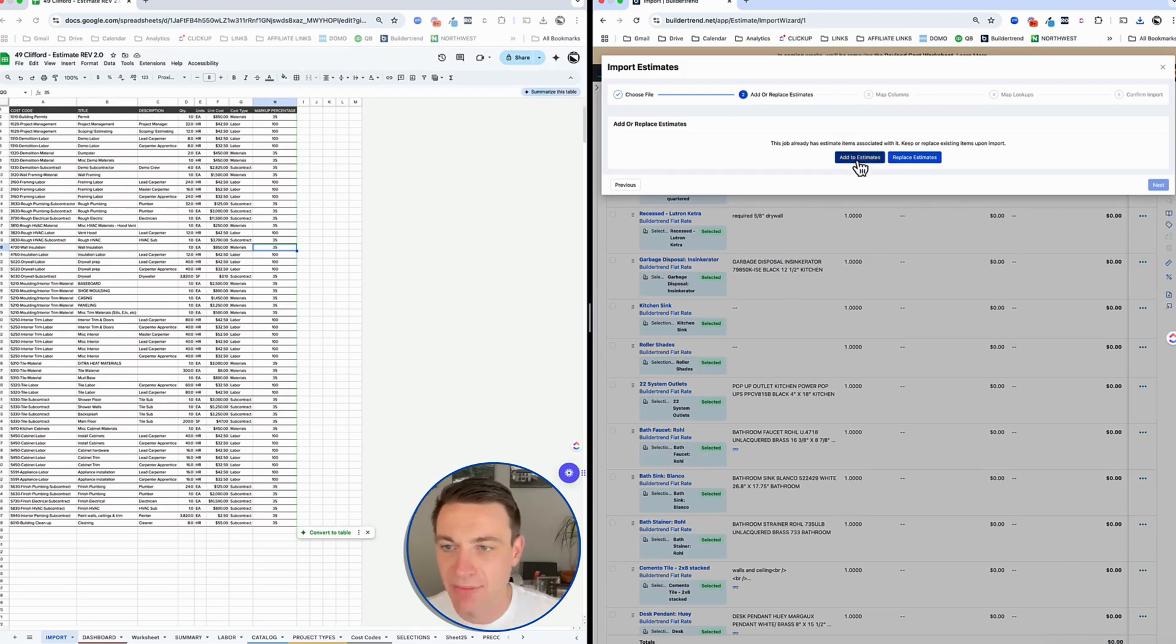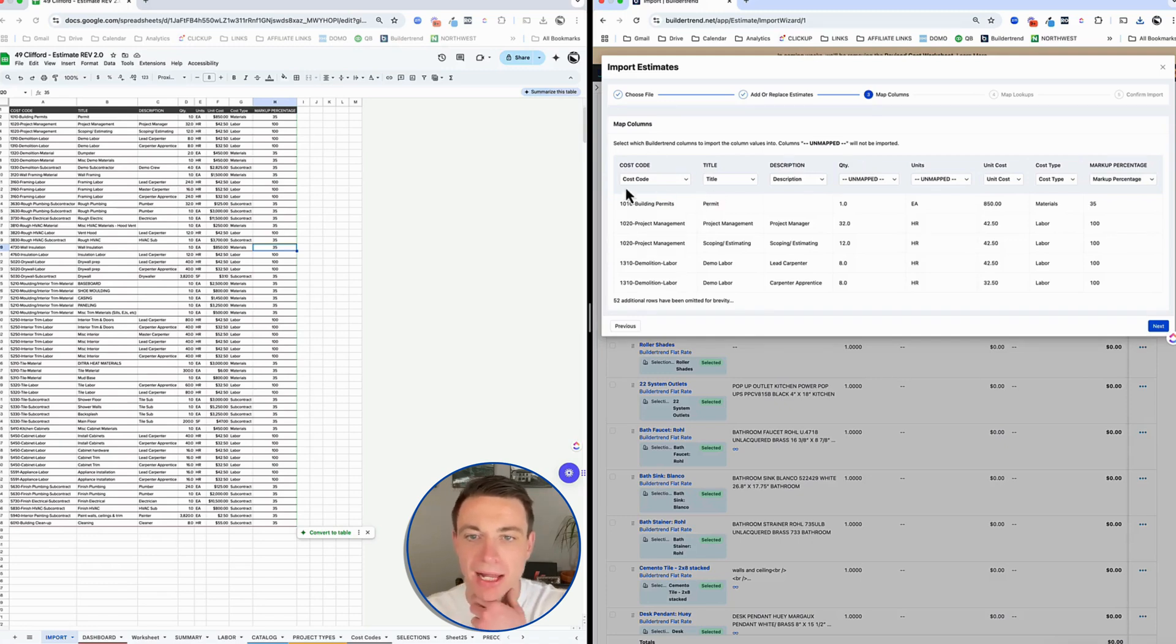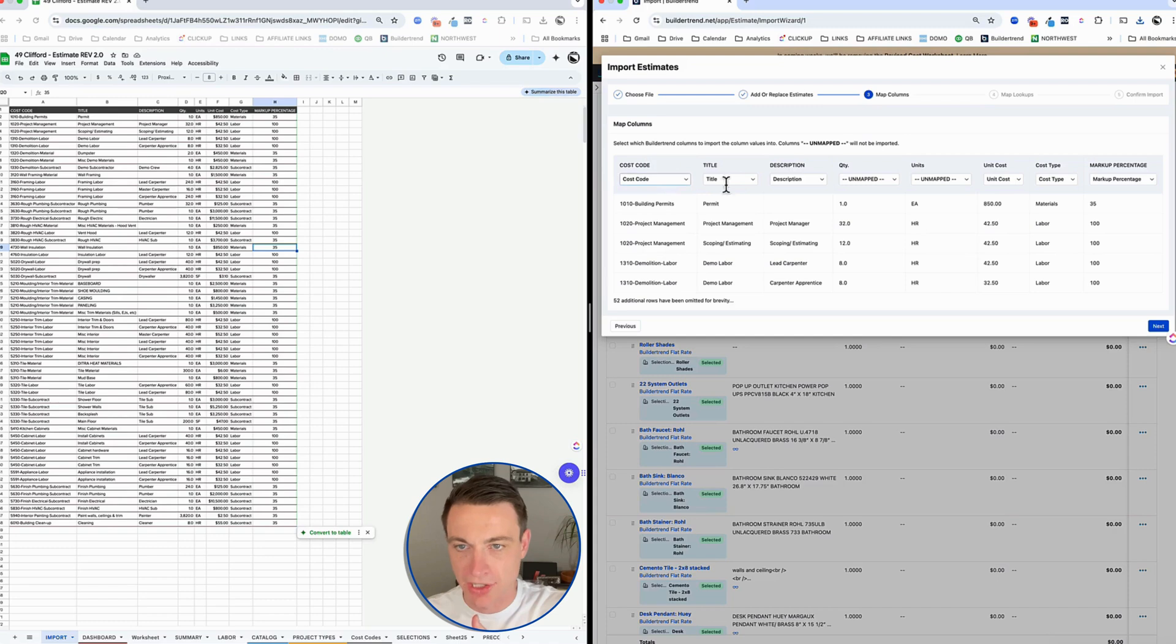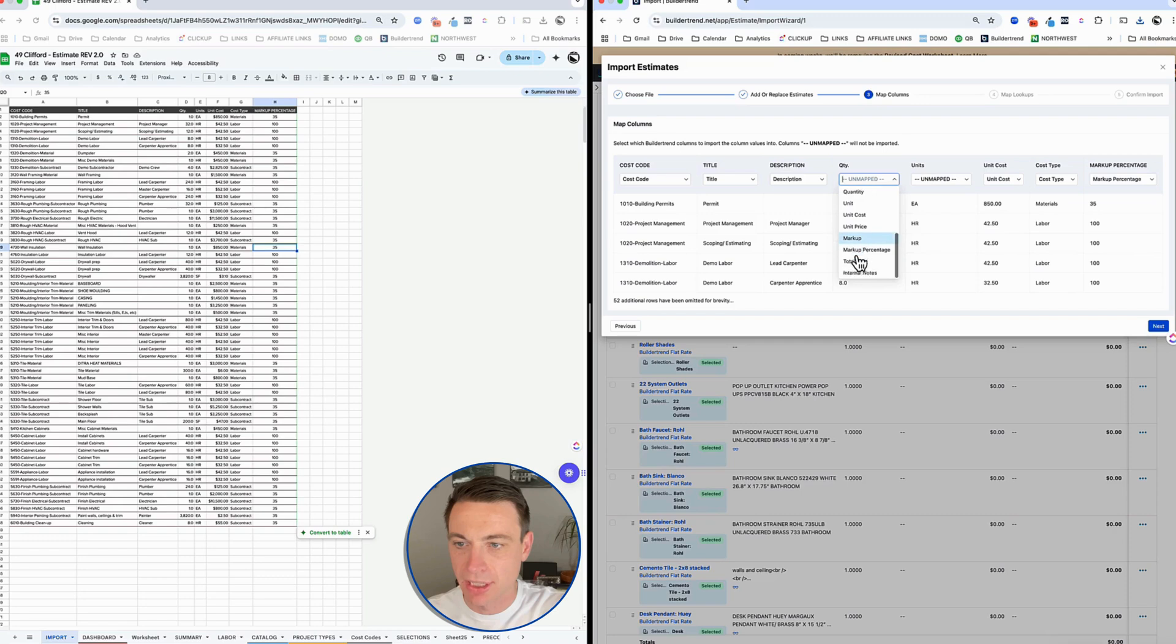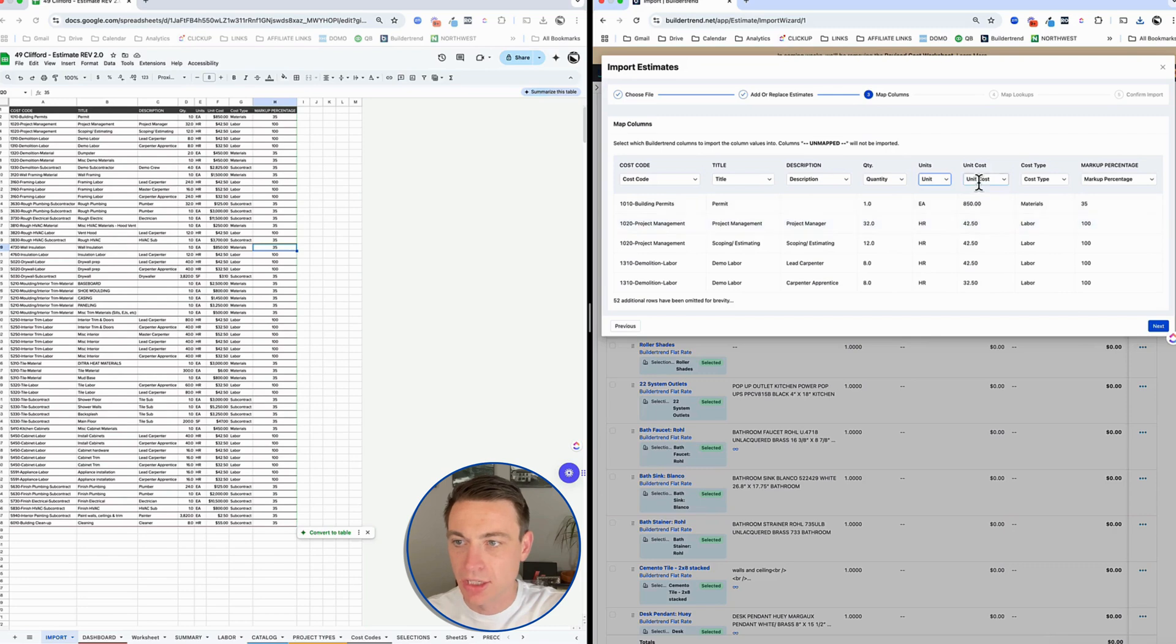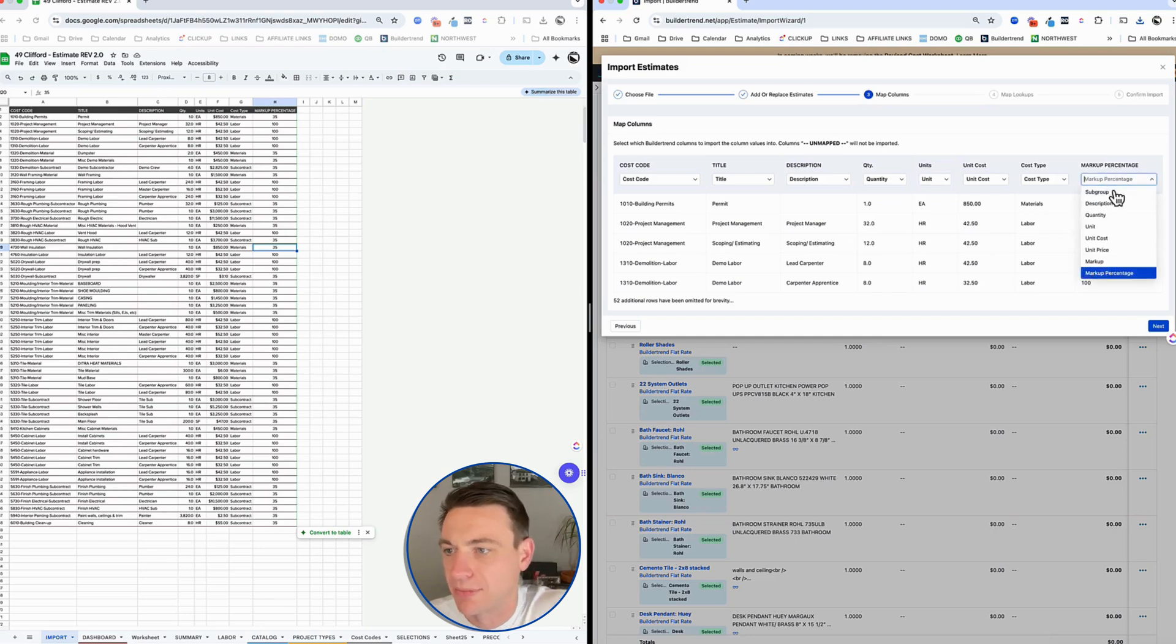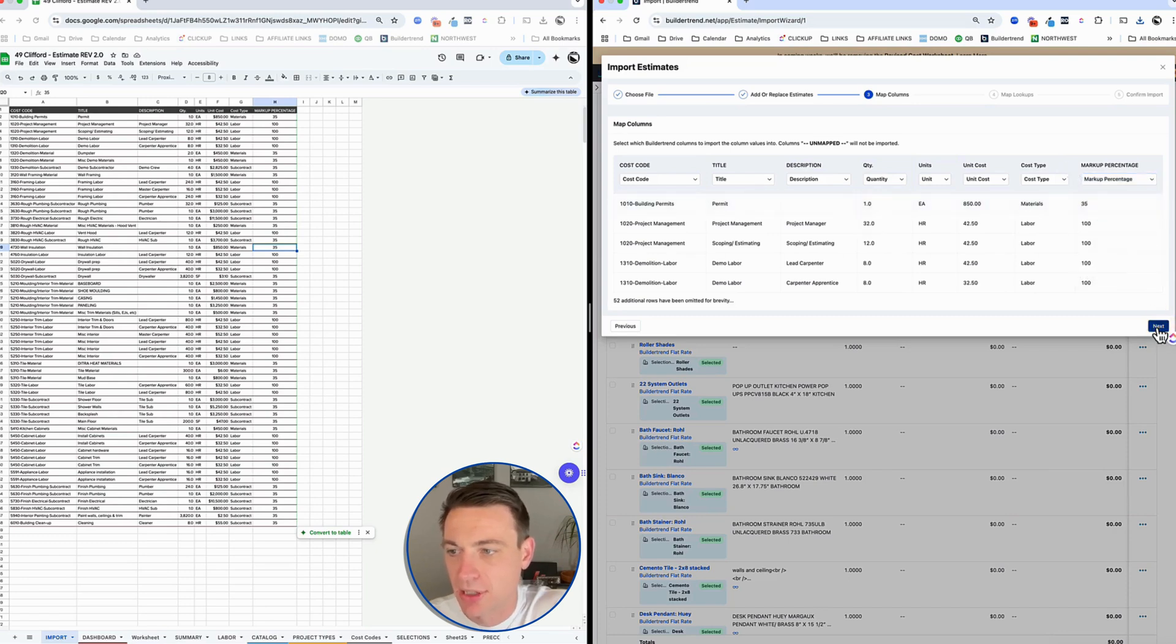Now I can bring it over here. We're going to spend some time and I think they've done a great job of helping you map this. I'm going to add to the estimate as opposed to replacing. First thing we have to do is map columns. Where I've indicated cost code, it's guessing that I want to map it to the same cost code column in BT. That's correct. Cost code, title, description, they look good. We can change that, but it's taking a really good guess. Quantity, it's not finding. I use QTY and they've got it spelled out. I just need to go in here and indicate quantity. Units maps to unit. Unit cost looks perfect. Cost type looks good as well. Here's where we need to make sure we're using profit markup percentage as opposed to markup. If I used markup here, it would do $35 instead of 35%. I want it to be percent.